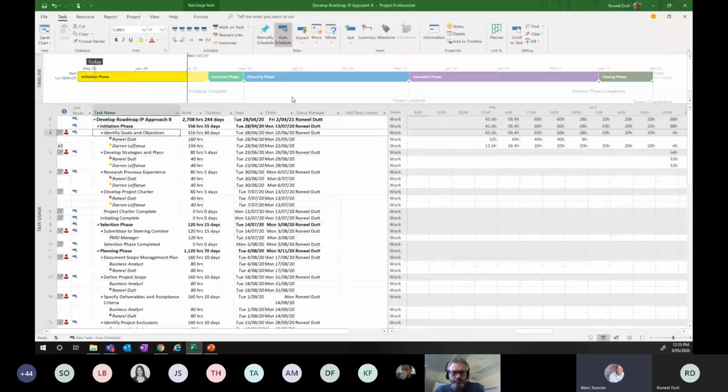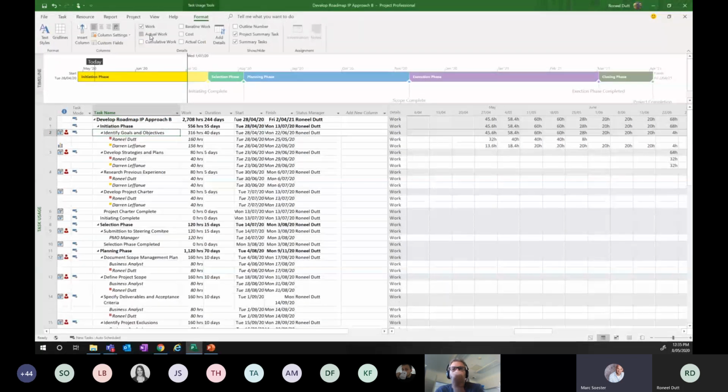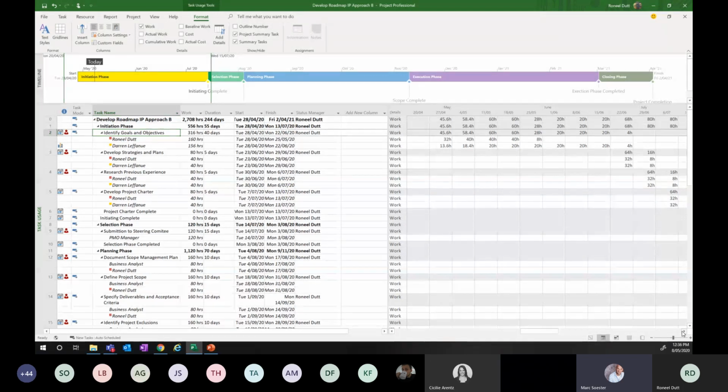One of the reasons why you would want to do that is to determine the progress update of a task, of a complex project, and that's the reason why we use assignment or time phasing updating of tasks in comparison to just saying, all right, I'm going to assign this task to you and you just tell me whether it's done or not. Depending on what kind of requirements you have, that will determine the complexity of how you would like to update that task information.